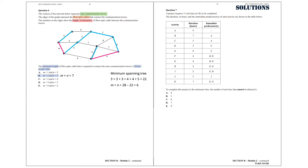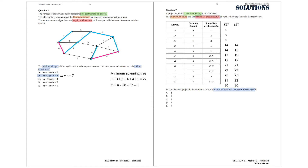The only option that doesn't satisfy this condition is Option B, because M plus N equals 7. Therefore, the answer to this question is Option B. Question 7. A project requires 11 activities, A to K, to be completed. The duration in hours and the immediate predecessors of each activity are shown in the table. To complete this project in minimum time, we calculate the earliest start time and the latest start time for each activity. The activities that cannot be delayed are those where the earliest and latest start times are the same, and that is 7 activities. So the answer we are after is Option D.